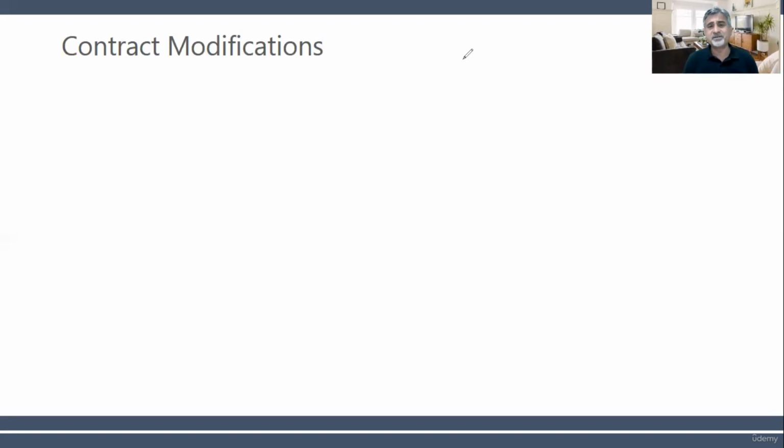It goes like this, finalizing the contract, because in their company, they have several approval levels. They have a procurement department, a commercial department, a supply chain department, a legal department. It will go through everyone. Then the same process will happen in my company. So it takes a lot of time and effort. So there comes a solution which is called contract modifications, and we do modifications. It's a very common thing.